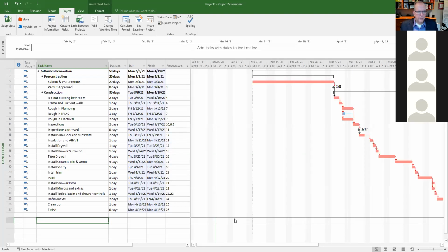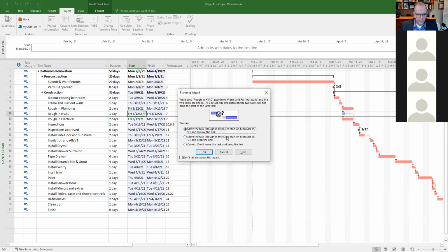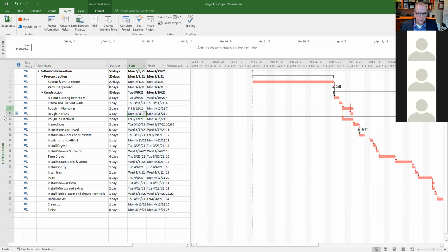What I don't want you to be doing is getting into the habit of clicking here and putting in dates, right? So you click here and it's like, okay, move the task, remove the link. Tom says I should keep the link, move the task, keep the link. You're putting constraints on the schedule. So in this case, you put a constraint that said that this task has to start here. It can't start any earlier than there, right?